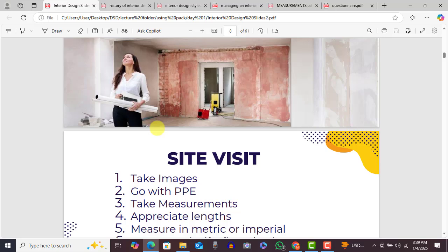I'll give you a little brief example. There are three consultants on the project. The original drawings we started with, a lot of things have changed. Part of every project, a lot of things change. We come up with different ideas. The kitchen, nothing stays the same. That's why we have the as-built drawings. At the end of every construction project, you need to produce how the building is looking now. But with these private individuals, they won't do it.